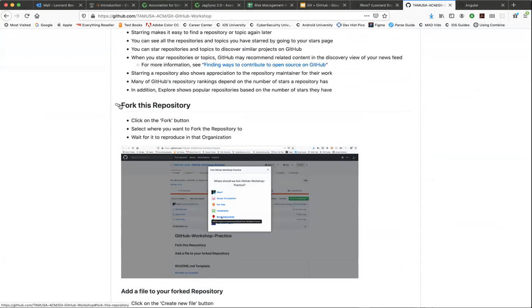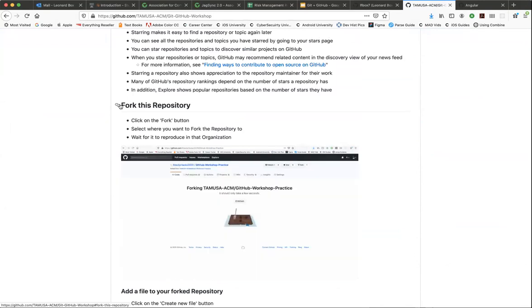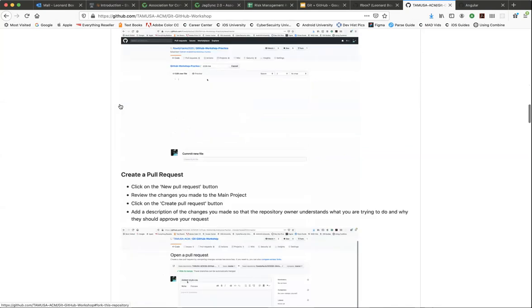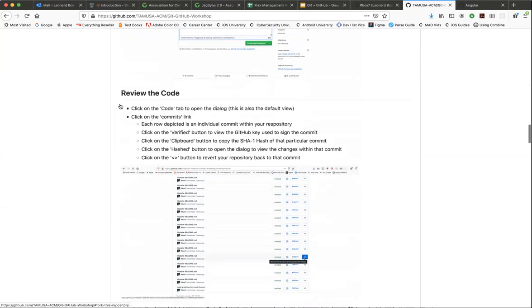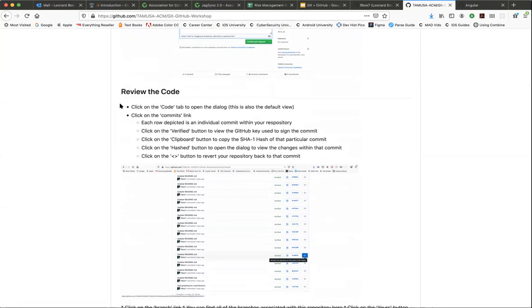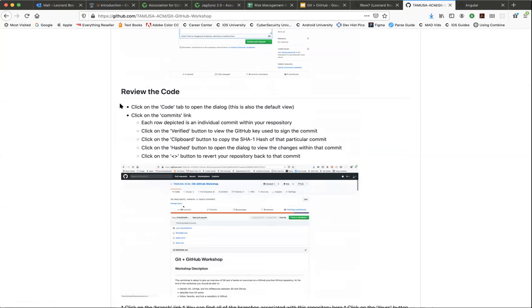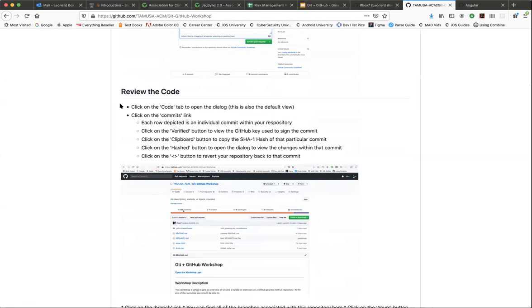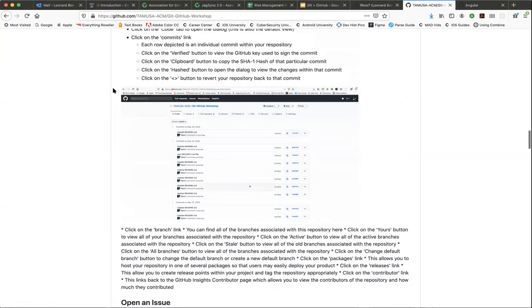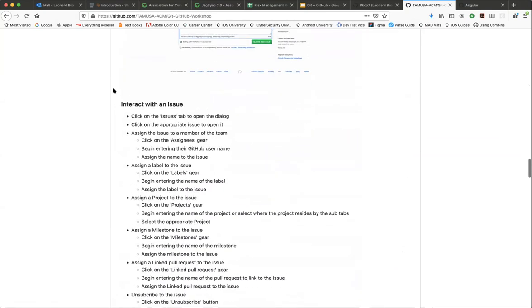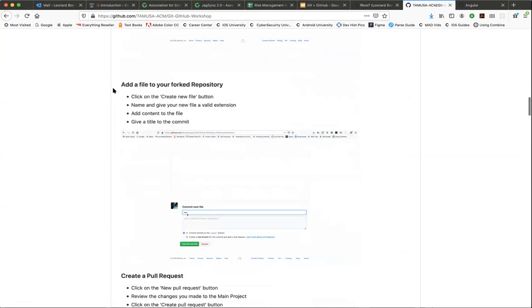When we set up your project on your own repository, we're going to automate that for you, so that as issues come in, in theory everything goes automatically. When an issue is opened, it goes to do. As you're working on it, it moves over to getting done, and then to completed. I think that's pretty much all we have on the issue side.